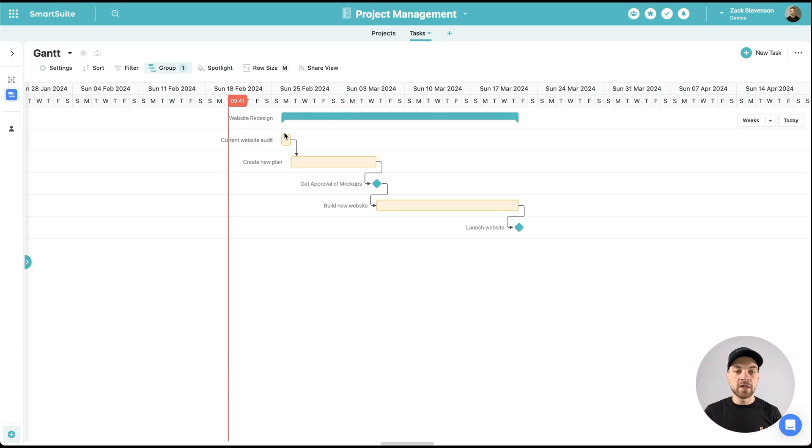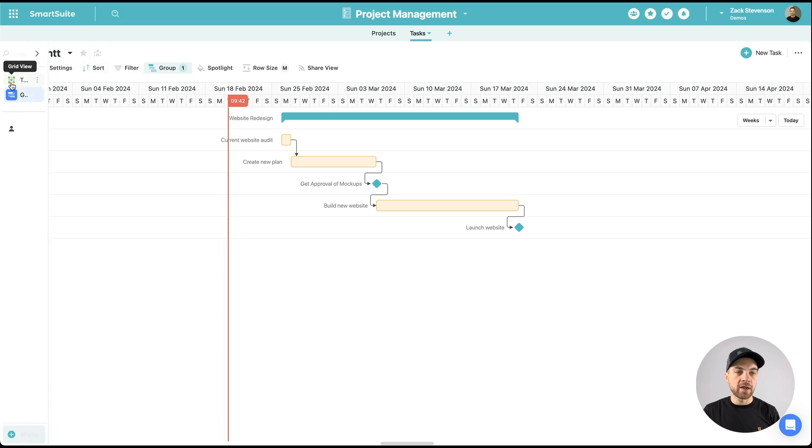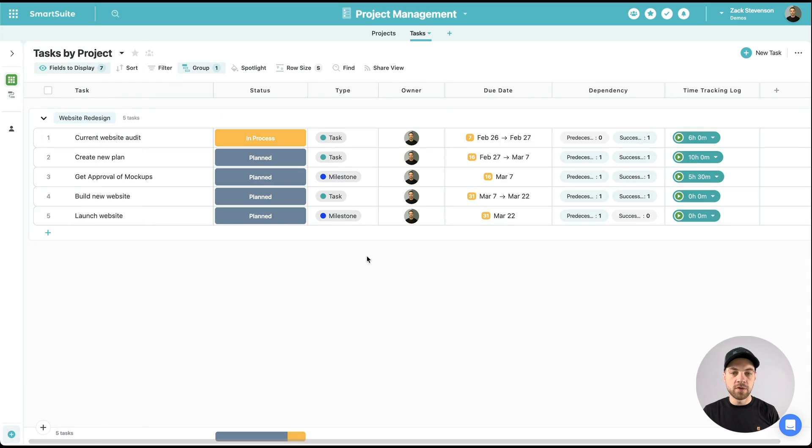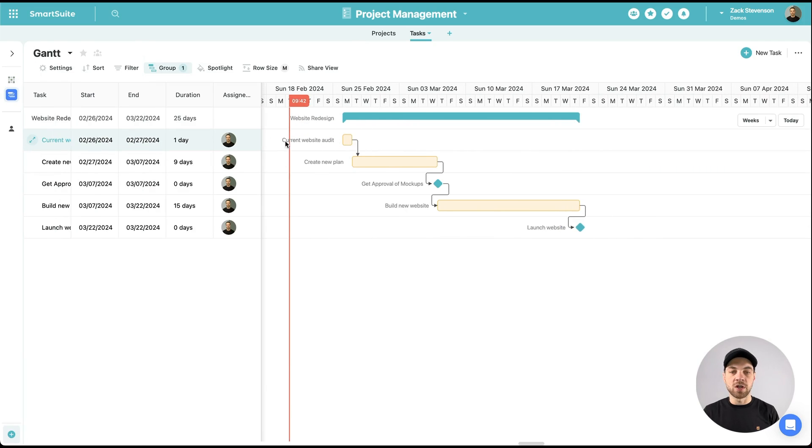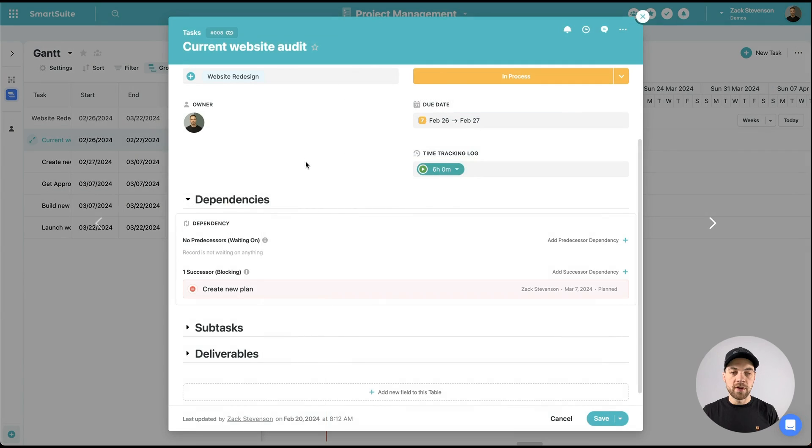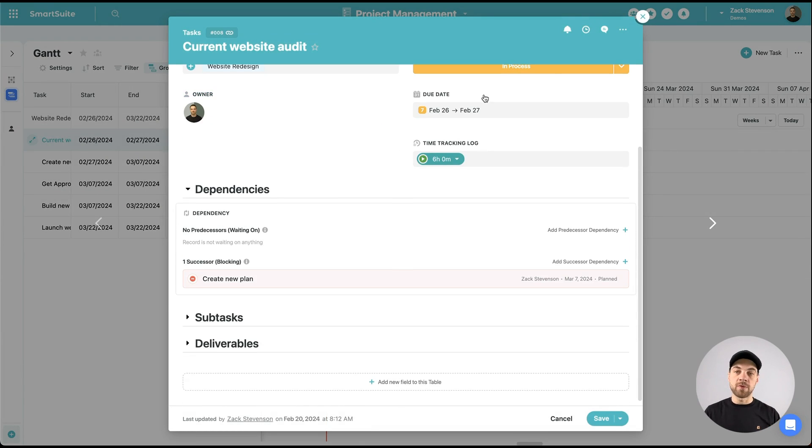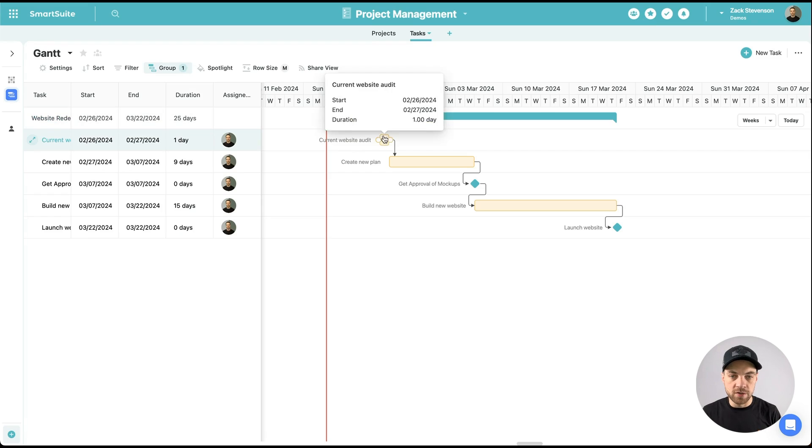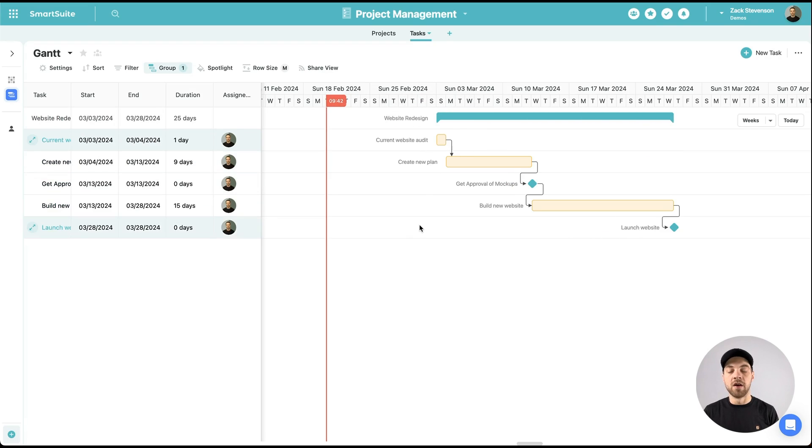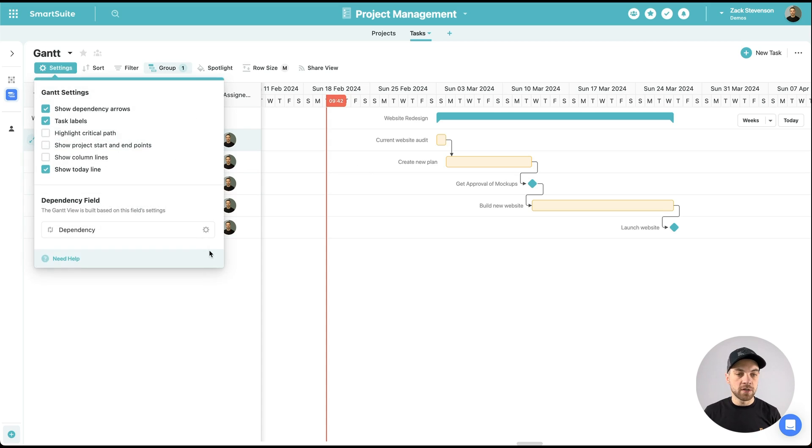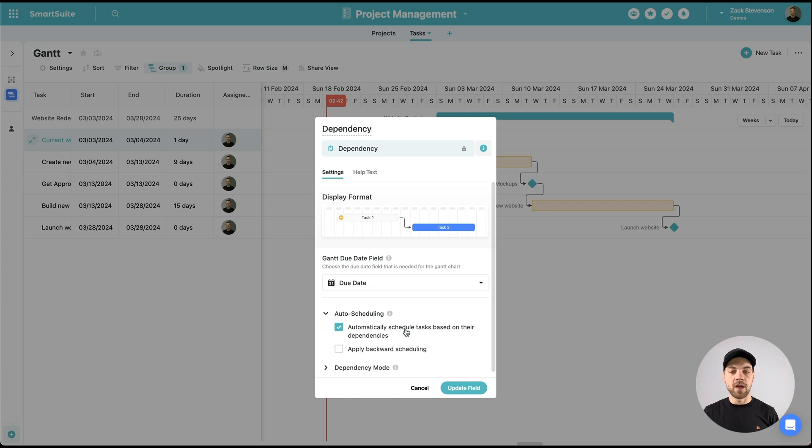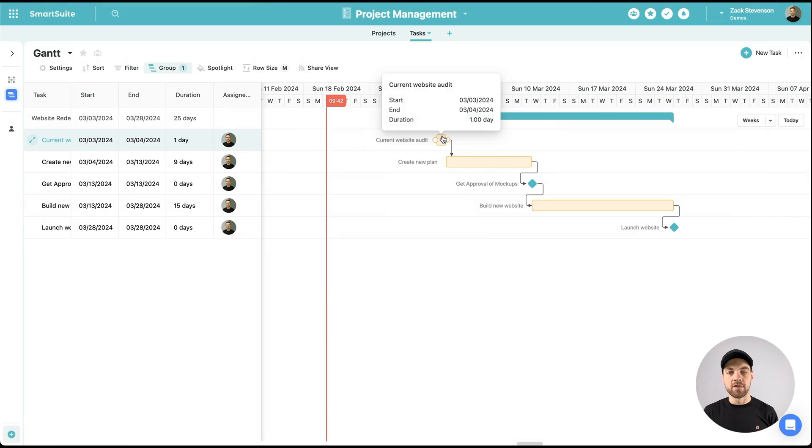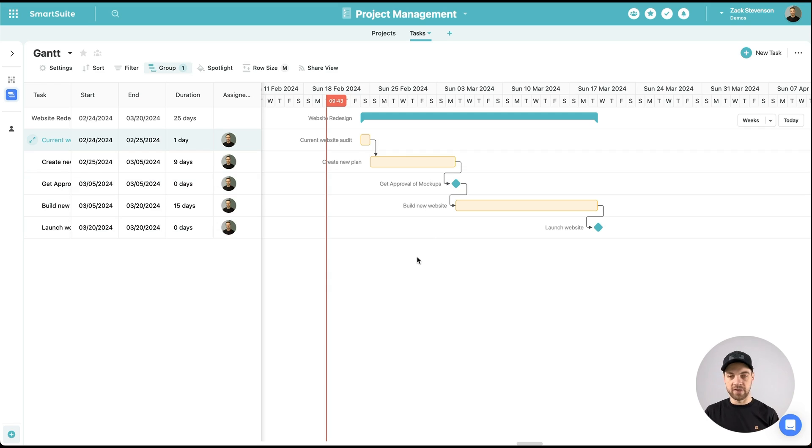What I've done here is we've got the current website audit, so that's the first task which flows through, and here's the icon that shows the milestone. If we go back to the grid view and where I have it marked as a milestone here and I've just selected one day, you can see how it gets plotted on the Gantt chart as a milestone. We can also click into the record from here to be able to view all of the data related to that specific task. We can drag if we want to advance the start date. If we need to push it off by a week or so, we can drag it across and the rest of the tasks will push out accordingly. And that's because of the setting that I showed you earlier. If we go into the settings here and the auto scheduling, I have automatically scheduled tasks based on their dependencies. So because I've dragged this back, the rest of the tasks will move in line with it based off of the number of days that we've assigned for the specific task.